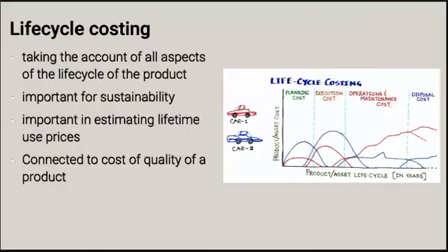So one thing that I need to mention before getting into the meat of things is this concept of life cycle costing, which is becoming a little bit more prevalent. And life cycle costing is taking into consideration not just the cost of the project, but as well as that, what would the product cost to the client after the project is finished and handed over. What are going to be the maintenance costs, the costs of running of the product, things like overheads, upkeep, part cost, and so on.